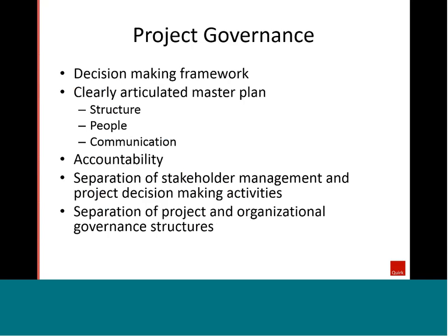One of the really, really crucial things for any project, and an aspect that often gets overlooked, is project governance. There's some ambiguity around what project governance is and how it is different to organizational governance. The difference between the two is that organizational governance is responsible for the day-to-day functioning of the organization, whereas project governance focuses on specific projects, and the governance hierarchy may be quite different to a typical organizational hierarchy.